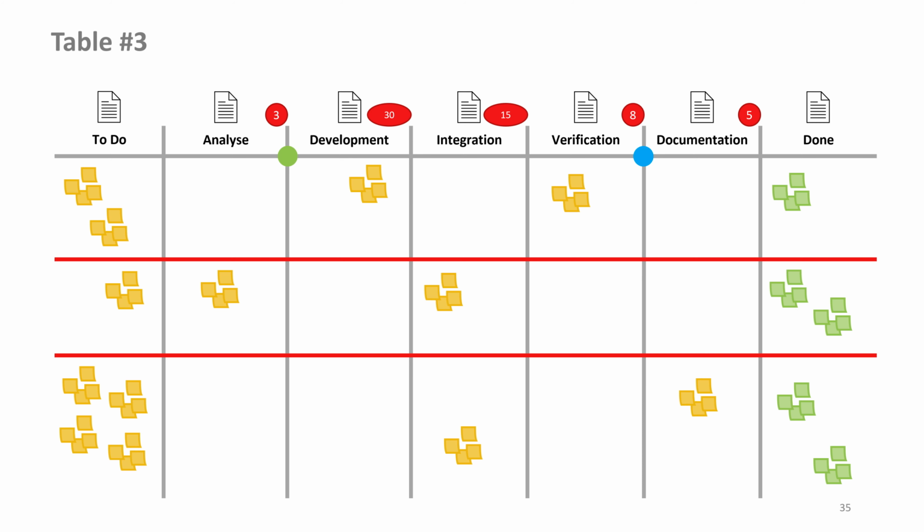In other words, the maximum work in progress has not been reached. That helps regulate the bottleneck. We can adjust the work in progress limiters over the entire flow so that we get as even a flow as possible, which does not overload bottlenecks.